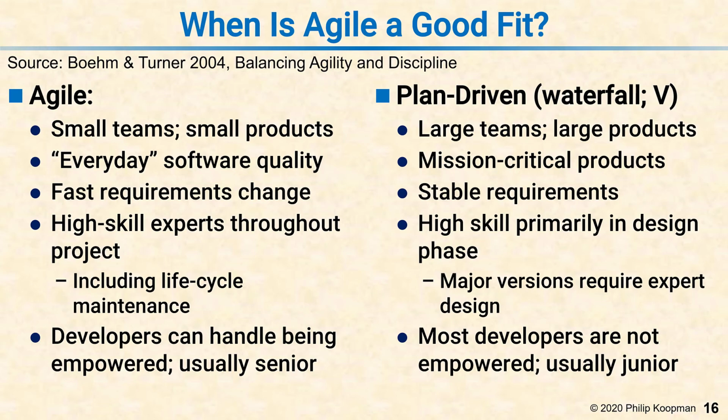But if you know what your requirements are and they're not going to change much, plan-driven can be a lot more efficient. Plan-driven makes a conscious decision to put the high skill in the design phase, not in the detailed implementation phase. So what you assume is that as you're going down the V of the waterfall, the earlier stages have the highly skilled people making the right trade-offs and making good design choices. If you're going to make a big change, you need your top experts really looking at it carefully because if they make a bad decision, the cost gets amplified as you go down through the rest of the process.